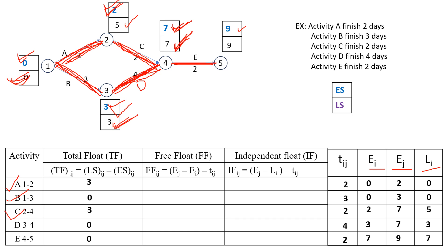Now we substitute all values into the free float equation: free float equals Ej minus Ei minus Tij. For activity A: 2 minus 0 minus 2 equals 0. For activity B: 3 minus 0 minus 3 equals 0. For activity C: 7 minus 2 minus 2 equals 3. For activity D: 7 minus 3 minus 4 equals 0. For activity E: 9 minus 7 minus 2 equals 0.